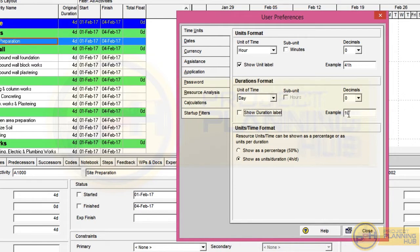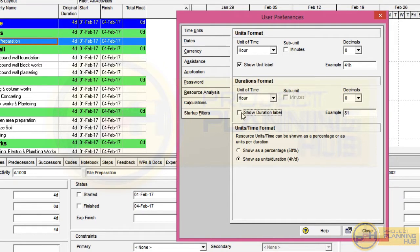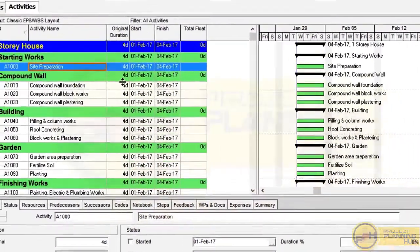When we unselect Show Duration Label, the letter D representing day disappears and only the number shows. When selected, it shows the letter D. Since we can select hour, day, week, month, or year as the unit of time, the duration label helps us identify the unit easily. For example, if the unit is hour it will show 81h — without the label we'd only see 81 and wouldn't know the unit. Always turn on this option. Now set unit of time back to Day, make sure this option is on, and close the window.